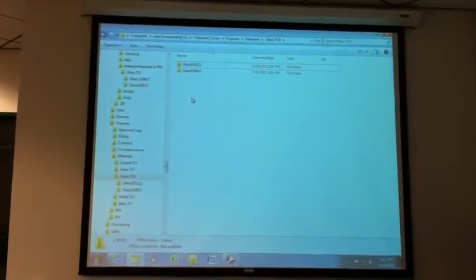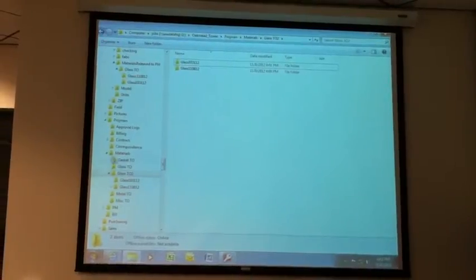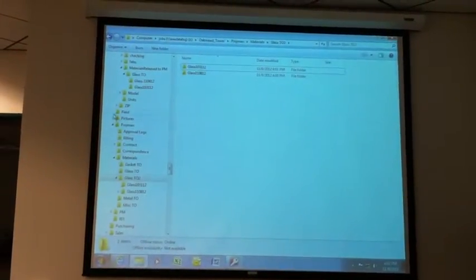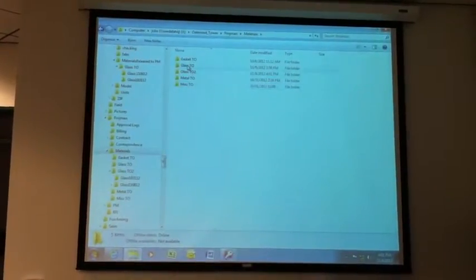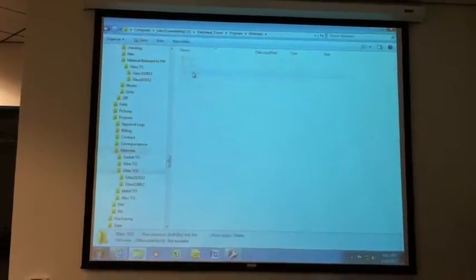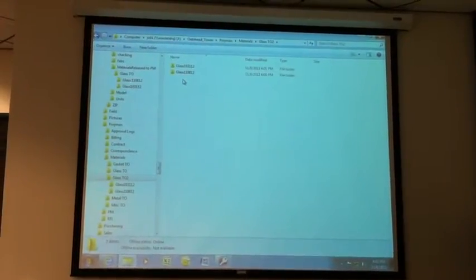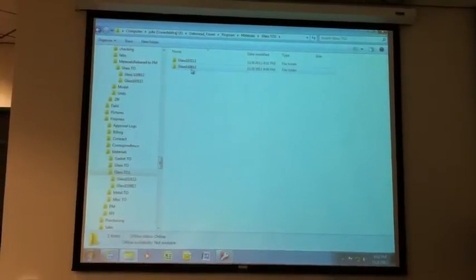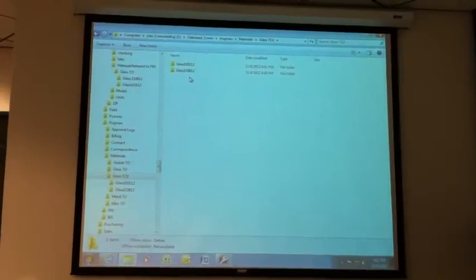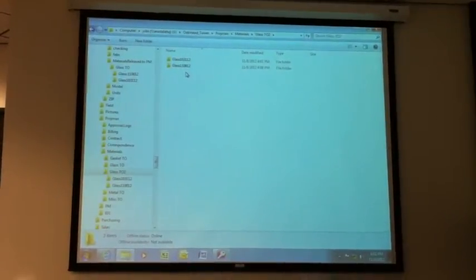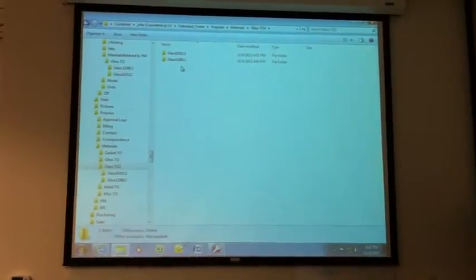Okay, if we come up with a folder structure that's going to resolve the issues that we had, we're going to create, in the ProjMan materials folder, the folders that are going to be releases, and they are going to be dated inside of the actual category. So we'll have the glass, and then inside of the glass folder will be the glass release with the date on it. That way any new folder that gets created will have a date, and they will sort. At this point, the PM could take ownership of that folder and do whatever is necessary.